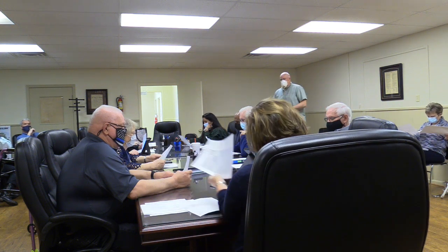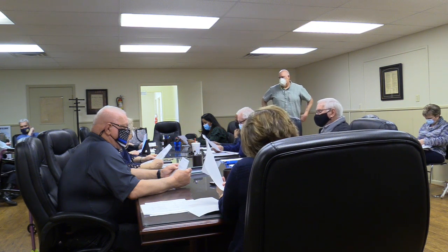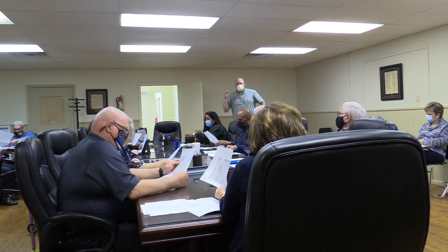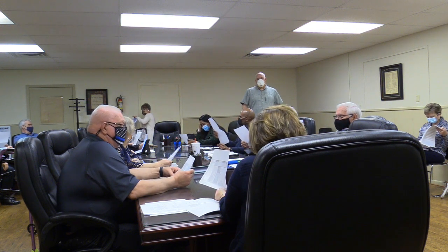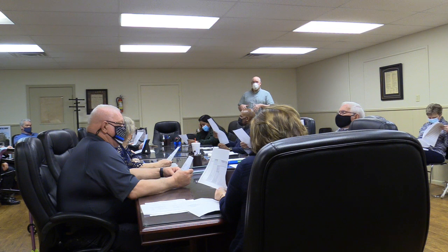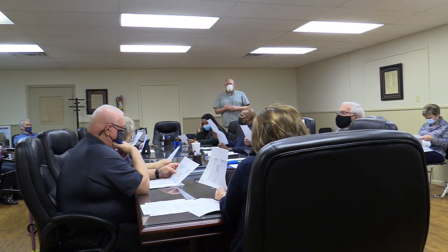So, let me know if you have any questions. It's a lot to cover. I don't think we have time to really go down all the line items, but a couple things to take away from this is that the budget's tracking really well. It's pretty rare in our business to start out with a project with your base bid of $11,098,000, and at this point in time, a year into this project, we're less than that. After all the change orders and changes, we're less than 11. We're 11,014,000.